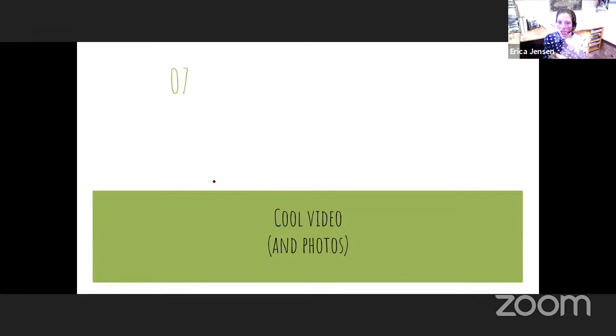What we did is we installed game cameras, actually, that you use for hunting, and we installed them on trees outside of the clearing limits, of course, and they would take a photo every 20 minutes or whatever we set the timer to. And this was useful not only for this cool video you'll see, but also so that we could check on construction at any point and be like, oh, have they finished the culvert installation? Oh, look, they're diverting the channel. So it helped from our standpoint, as well as, you know, anybody we gave this link to, PM&E could access this and check on the construction.